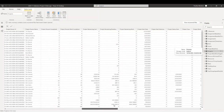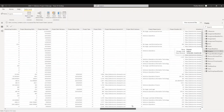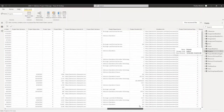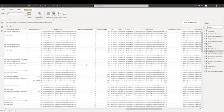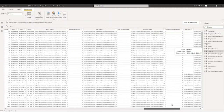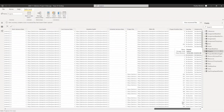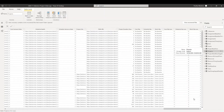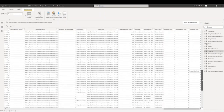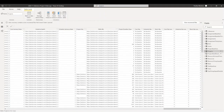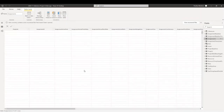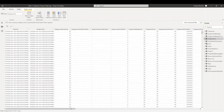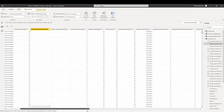You also have metrics like remaining work, remaining cost, percent completed, variance, project status, date, due date, schedule link, work health, schedule variance, and even some schedule slip and work slip KPIs in order to better measure and analyze your projects. Similar information can be seen on the assignments and tasks tables. On the assignments table, you also have start date, end date, cost, budget cost, finish date, variance, remaining cost, and remaining work.